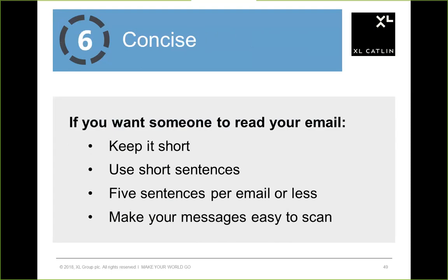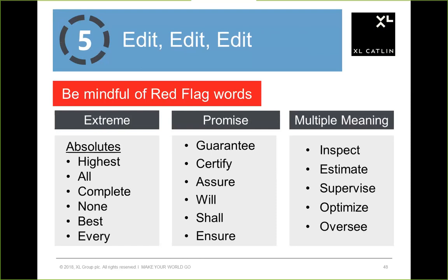Randy, I'm going to jump in on that one too. On the red flag words, our company is careful to remove these words from client contracts. In fact, these words don't appear in Hansen's form of contracts, because we don't want to be contractually bound or have a client or judge interpret our contracts against us.